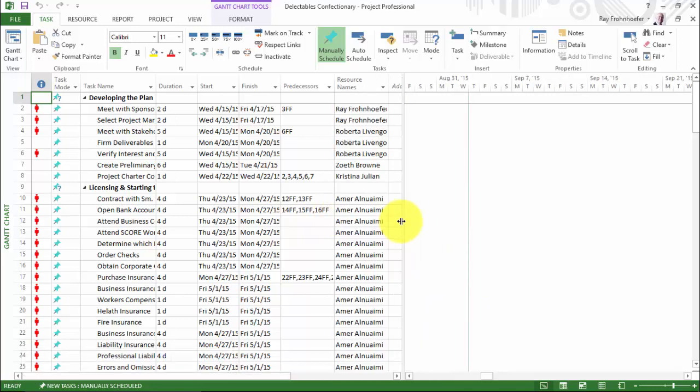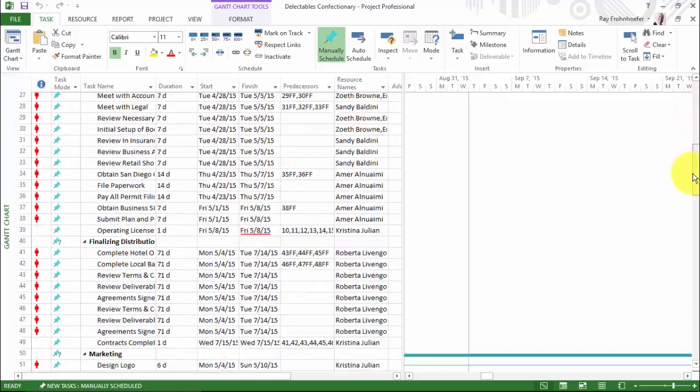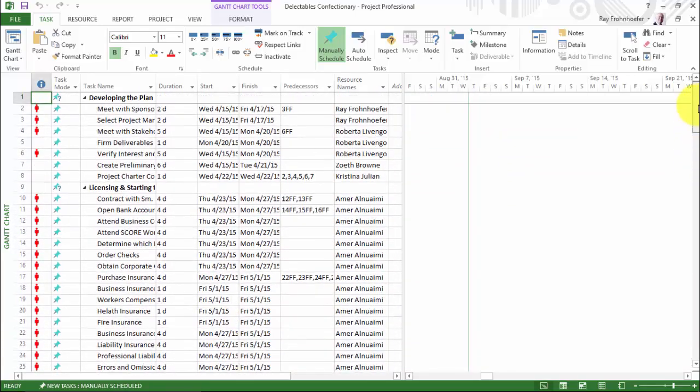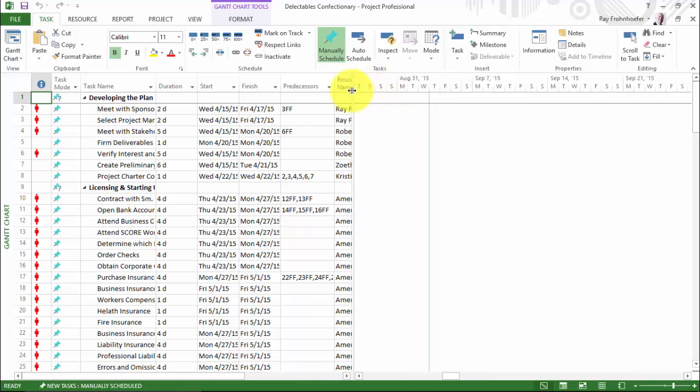Now, they didn't take care of over allocations, and the other potential issue is I don't know that Smartsheet supported the task modes, but the nice part is that I have a sheet that I can read directly into Project, and I could modify it, write it back out as an XML file, and then it could be read back into Smartsheet.